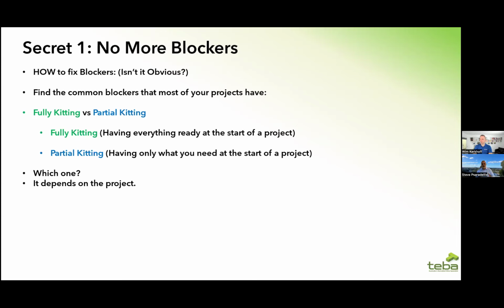If you've got a project that's going to run for a week, I'd strongly suggest you fully kit. Have everything ready before the project starts. That way, that project will start and finish within that week. If you've got a project that runs for 3 months, sometimes it's not practical or wanted that you fully kit. I'll give you an example. We implement some software, and during the implementation phase, we can use trial licenses, and it takes 3 months to implement. Would we sign up the client to their full licensing if all we need is a couple of test users on day one? Well, no, they're going to be paying for 3 months worth of licensing that nobody's using.